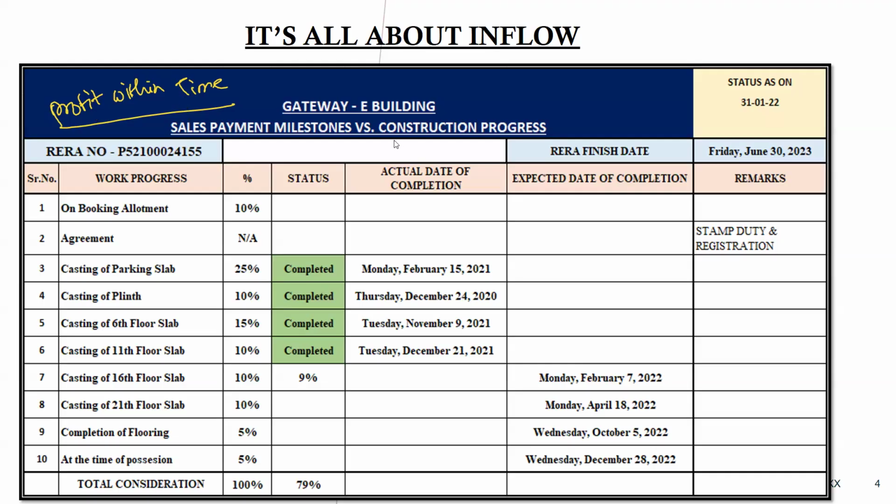The value of that profit will decrease, because the time value of money is very important as far as the money invested in the project is concerned, whether it is a project financed project, a self-funded project, or a partnership project wherein you have pulled funds from various instruments, from banks, financial institutions, or other lending or investor agencies. So profit within time is very important.